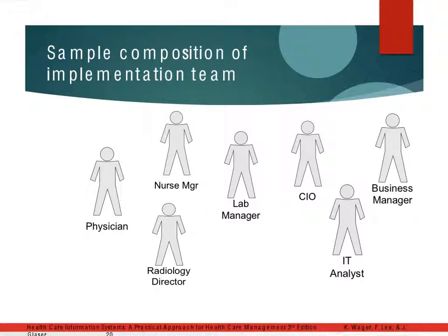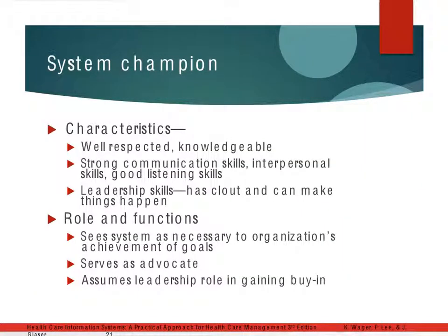And the go live date. Go live should be when patient volume and census is low. So if you are a pediatric office, you probably should not have your go live for an electronic health record during RSV and flu season. You should probably do it shortly after kids have gone back to school. And actually, that is what my kids' pediatrician's office did. We just went the other day, and they went live on a new EHR about 3 weeks ago. And they said the timing was pretty good for them.